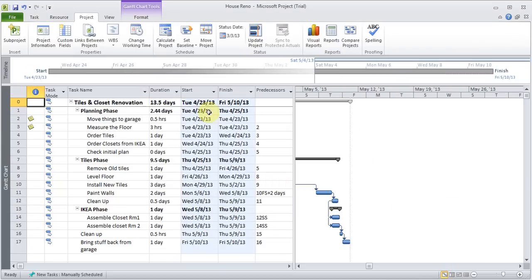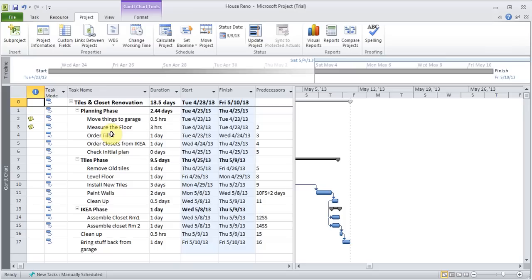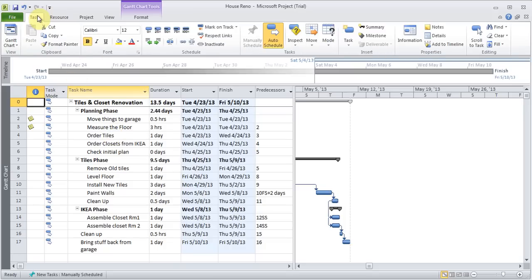Now, as soon as I did that, you see all the dates changed, and it puts everything in place so that the project will finish by that date. So, that's a neat little thing that if you wanted to just test something out, you can set it by starting date, or you can say I want to finish things by a particular date.